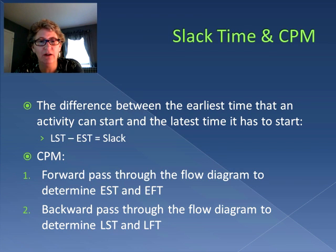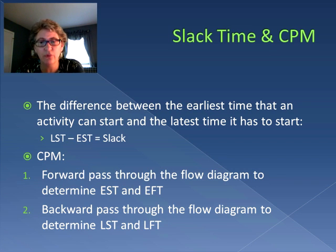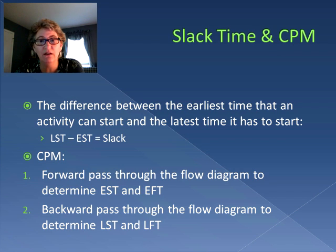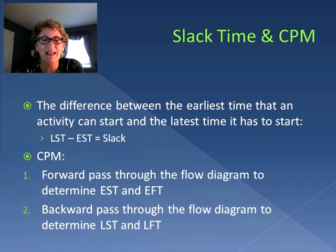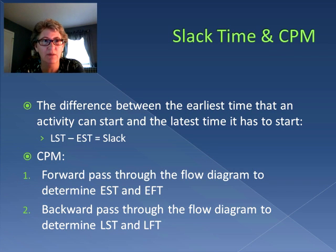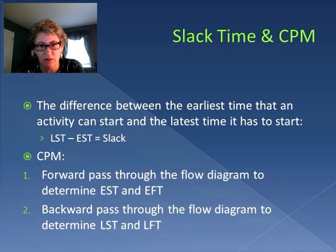In order to figure out slack, we use what's known as the critical path method, where we take a forward pass through the flow diagram to determine when all the activities can start — the early start time — and as a result, also when the earliest they will finish, which is the early finish time. Then we take a backward pass through the flow diagram to figure out when the latest each activity can start and when the latest each activity will finish. That's the LST (latest start time) and LFT (latest finish time). Then we compare the two. If there is a difference between the early start time and the late start time, we know there's slack.